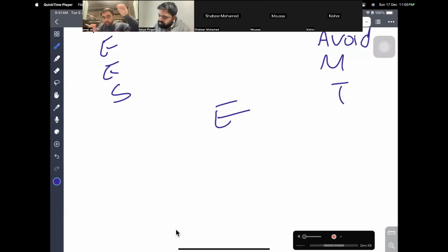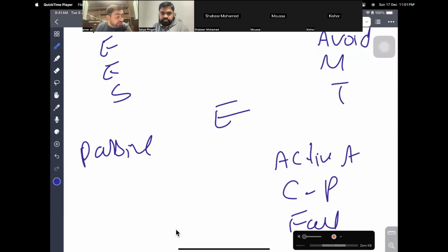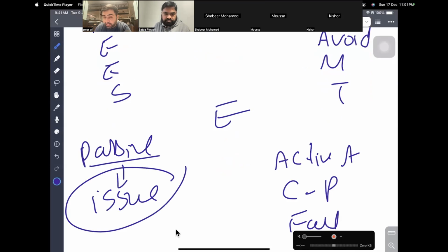to that. They monitor the risk, and when it occurs, this is called active acceptance. Then they implement the agreed plan, which is known as the contingency plan or plan A. If that plan fails, we have a fallback plan. Those risks which you identify and don't make a plan for are called passive risks, and we handle them as issues in our project if they occur, because we don't have a plan for them.